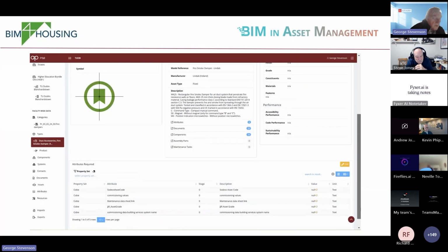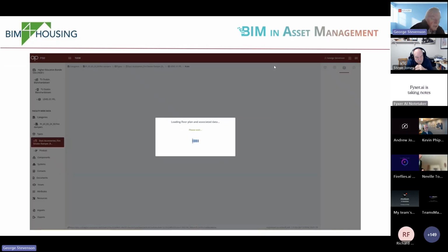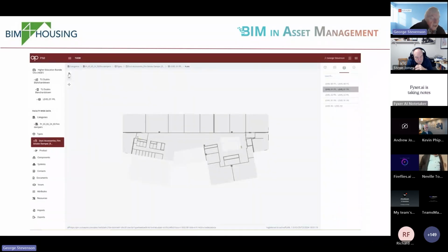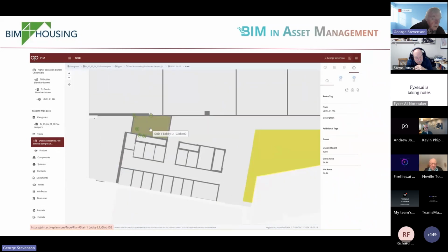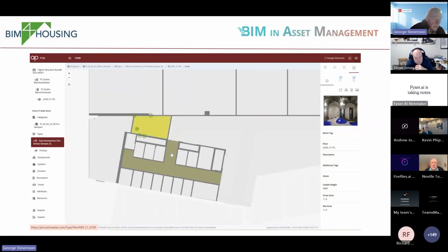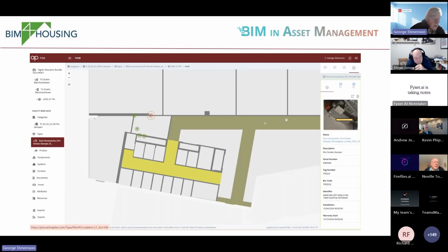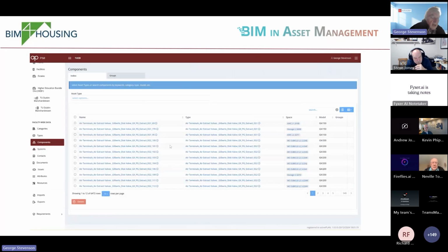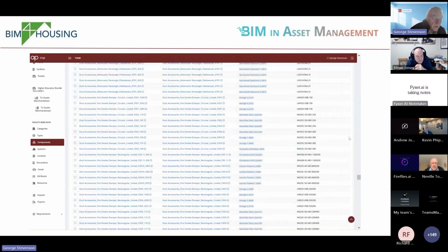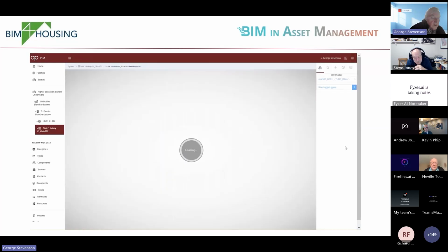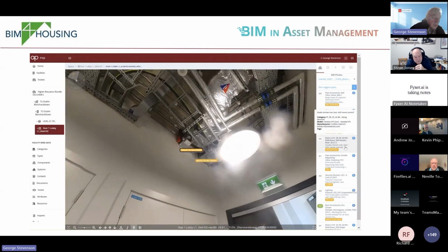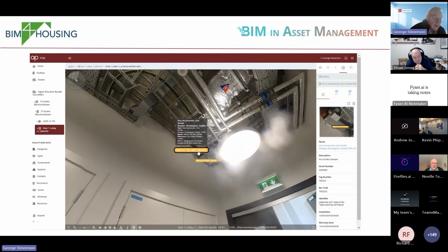the product information. So we've got the golden thread relationship between the need for a fire damper, what product was selected, where it has been installed, and then we're also tapping into other information that was collected using OpenSpace by the construction team, which are 360 photographs that the asset teams can use, which is a fantastic way of tying all these things together.